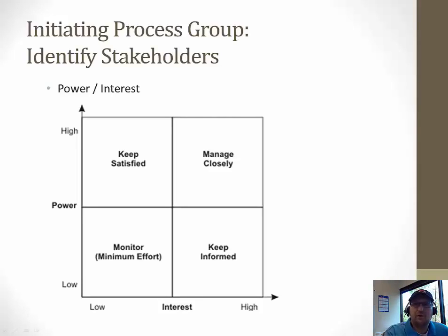Make sure you don't put stakeholders where they should be when you're doing this, or where you would like them to be. This should be done in collaboration with the project manager or with another person in order to keep it as objective as possible. This type of information on a project is not meant to be distributed, so it's sensitive information. You want to keep it with your project documents and keep it confidential.